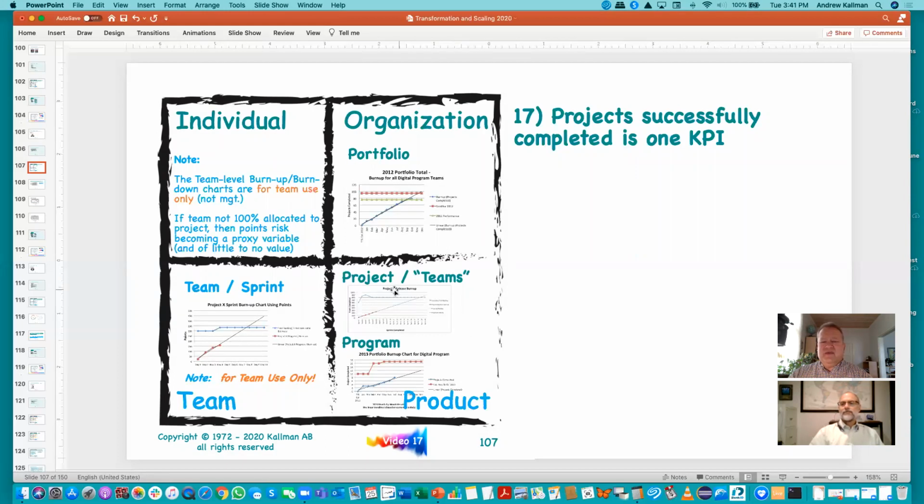The other thing that we had is what we called a cumulative chart, and it had the total points for each sprint as we were going through the project. And it was sort of fun. You could see where summer vacation hit because the line almost went flat, and then it picked up again and went upwards again in the fall. And so that would be a project or a team consolidated view, and that's a sprint by sprint tally.